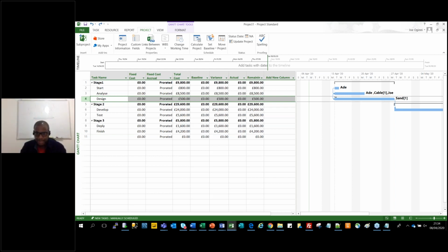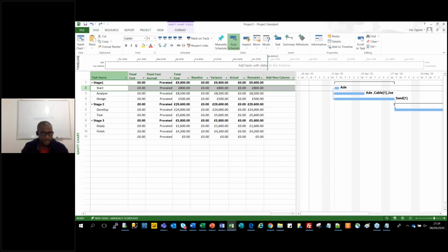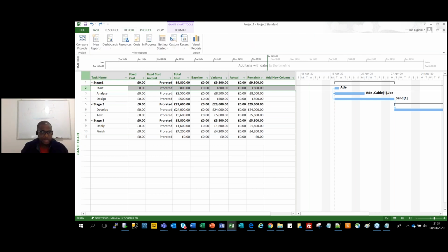You're telling this person to do this task, and you tell them again to do another task. And the system is going to tell you they can't work on those two at the same time. You see a conflict coming out around somewhere here. You're going to have some conflict which needs to be resolved. That means you're telling me to work 8 hours a day today, and the same day you want me to do another job. The system is going to say it's not possible. He already has an assignment for that day. Now, do you want me to sort it out for you? You could auto sort it out. There are a lot of things you could do. You can auto level on a project when you have conflicts.